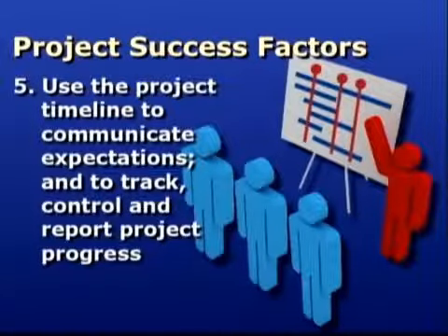Equally as important to creating the timeline is the fifth success factor. The project manager must use the timeline to communicate expectations to the project stakeholders and to track and report project results. Now, you may think this is fairly obvious, but I can assure you that I've seen many instances where the timeline is created because management required it before they would approve the project, but then it was never used when executing and controlling the projects.